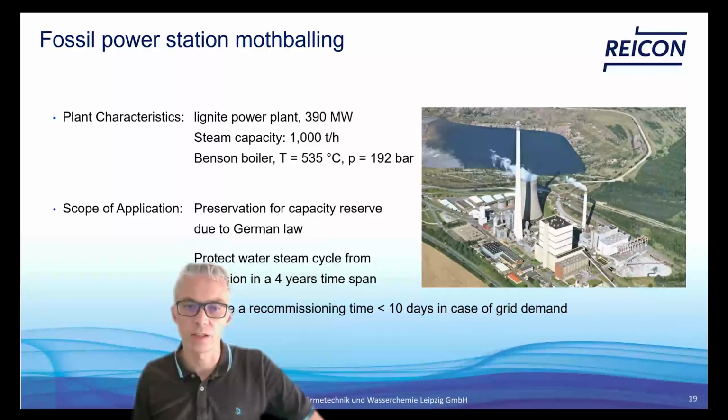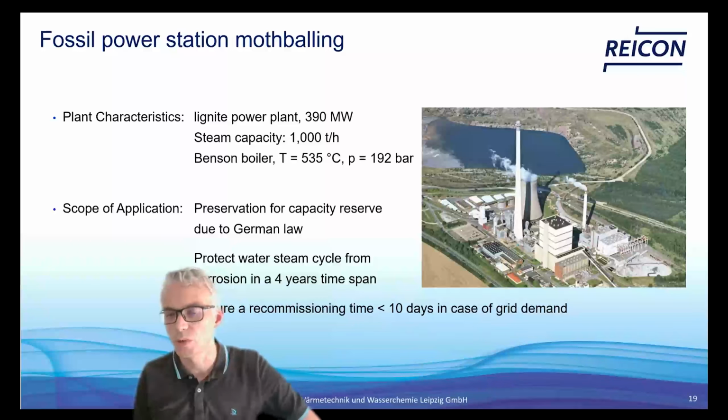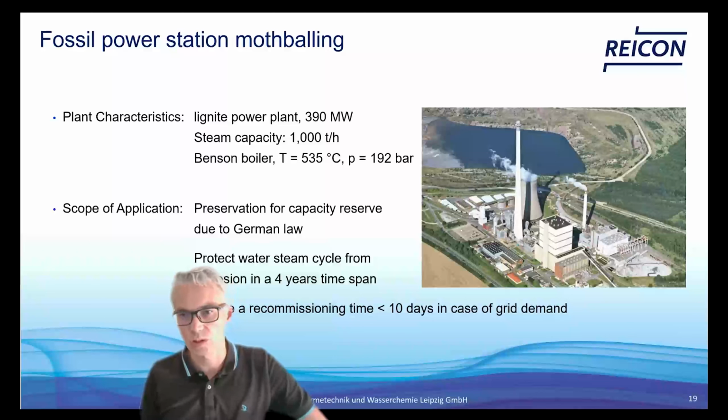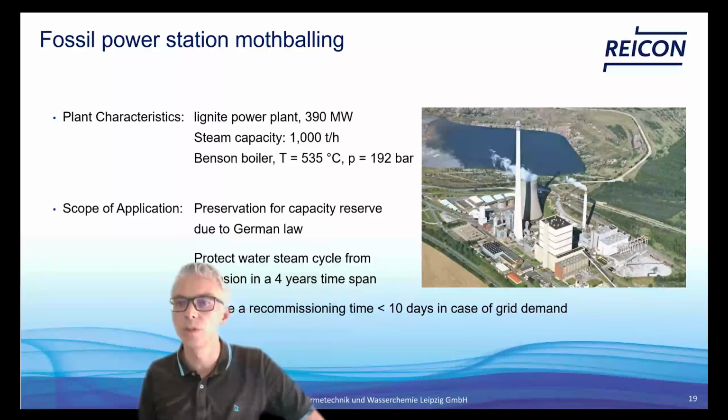And they need to ensure a recommissioning time of 10 days in case of a demand. We have to say that this plant was never recommissioned because it was a very old one, but of course they need to protect the system somehow, and they chose the FFA treatment for their preservation.